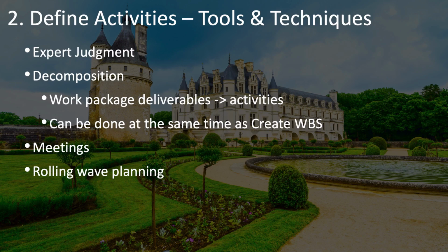Meetings are another key element, and you'll need all of your meeting skills and rolling wave planning, which you recall is the idea that you may not have all of the detail up front, and there may be areas that need refinement later on as you go. So not only may you have some scope that isn't fully defined yet, you may also have some portions of your schedule that aren't fully defined yet, and you elaborate on those as you learn more during the life cycle of the project. This is known as rolling wave planning, which applies equally well to both scope and schedule planning.